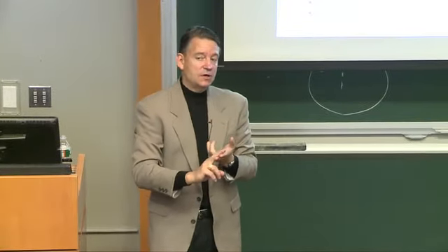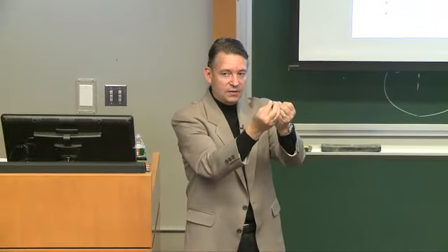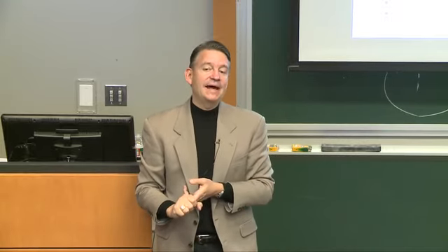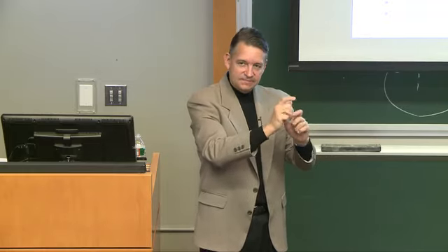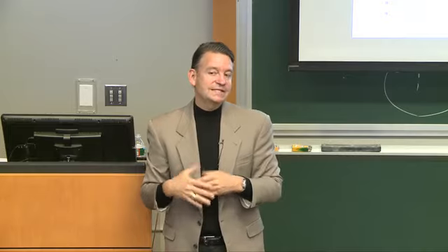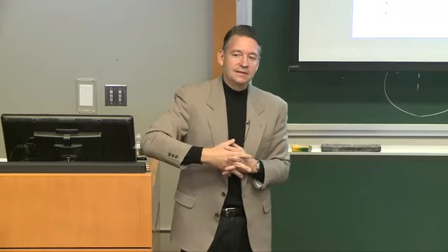Yes? I was wondering what makes the cost estimate so accurate with this method? So there are three major ways of doing it. Veronica should answer that question since she's working on cost modeling for her research. There are three major cost estimation methods. One is bottom up: you have the product decomposition and you add up all the costs. One is costing by analogy, where you look at a prior mission or a prior product and then look at the deltas. And the third is based on so-called CERs, cost estimation relationships. It's a parametric method. You can also blend these.